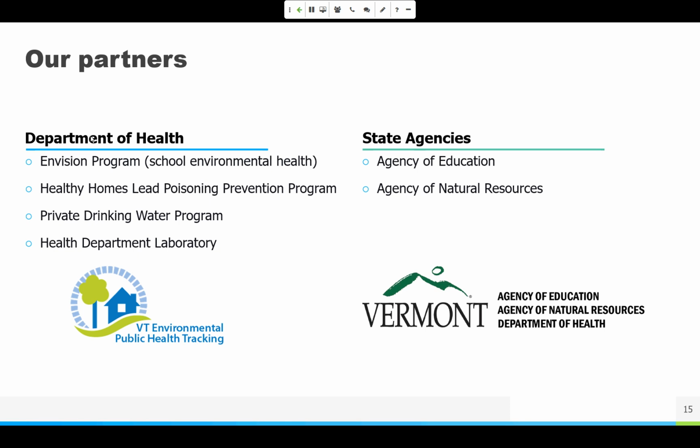Finally, we had a clear backbone coordinating organization. So for this project, the health department fulfilled that role. I've been involved with other collaborations where there isn't sort of one primary agency that bears the ultimate responsibility for the project. And since everybody's sort of loaning their time to the collaboration, when there's something to be done, everyone scurries in order to avoid being tasked with responsibility. Here, it was clear that the health department had primary responsibility for the project, that Michelle had primary ownership as the project manager, and so the roles and the responsibilities of the collaborators were clear, but ultimately the health department and Michelle as project manager had accountability for making sure that the project progressed towards the goals.